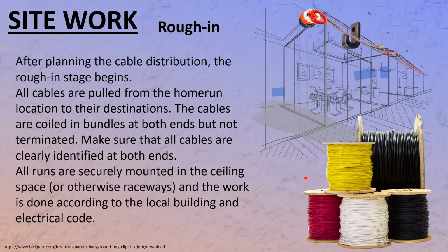if you have, let's say, so many wires to be pulled, and it's going to take, let's say, 10 hours for a 2-person team, you eliminate one person, it's not going to be 20 hours. It's going to be at least 30 hours. It's just how it works.